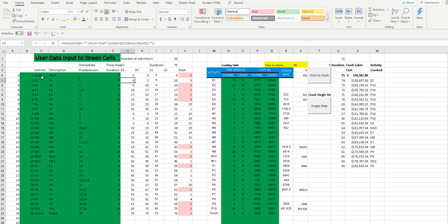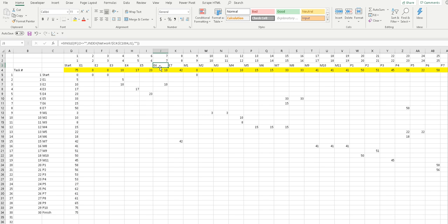See, column C are our activities. And then we just go down the right number of rows to get here. Okay, there again, we just take the max of whatever is in this column, and the columns are the sum of the early starts of the predecessors and the durations of the predecessors. All right, I think I beat this page to death.